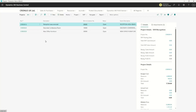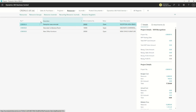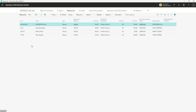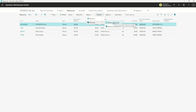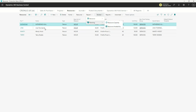Another thing to look at is resources and the tools around their availability. On the planning section we can set the capacity for each resource. For Catherine, we can set what calendar she works to, what days she's working, mark days where she'll be absent, and specify how many hours she has available on each of those days — which might be different from Lena, Marty, or Terry's calendars. We can also check availability: if Catherine's been booked against projects, she's not available for others.